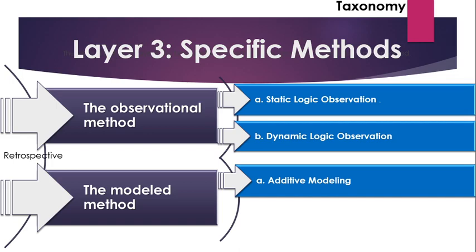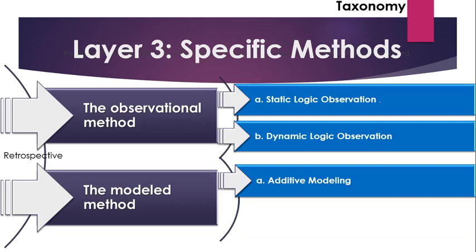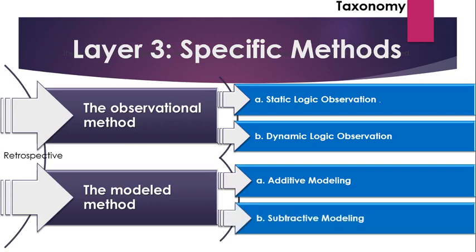This term or its equivalent, time impact evaluation, has been used in contracts and specifications to refer to other basic and specific methods as well. B. Subtractive modeling. The subtractive modeling method consists of comparing a CPM schedule with another schedule that the analyst has created by subtracting schedule elements, delays, from the first schedule for the purpose of modeling a certain scenario. The collapse as-built is one example that is classified under the subtractive modeling method.